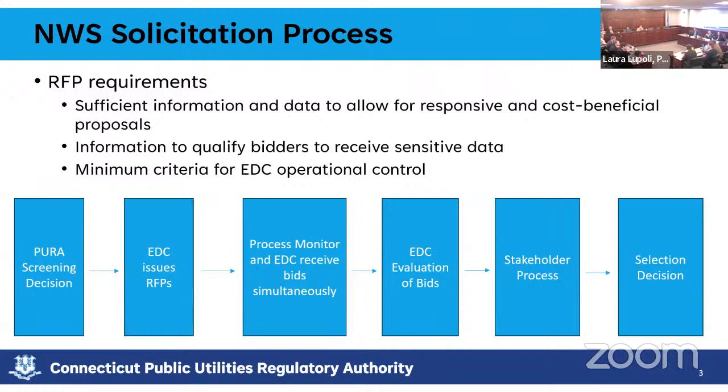We've seen that the first cluster, which will probably kick off sometime in October, could take about 2 years. So any DER up for application after the October timeframe would have to wait at least 2 years to get into the next ISO cluster study. That does create an immediate delay issue. And correct me on the number, Mr. Freeman, at 5 megawatts you automatically are level 3? No choice, yes. At 5 megawatts, level 3, you're going through the full interconnection.